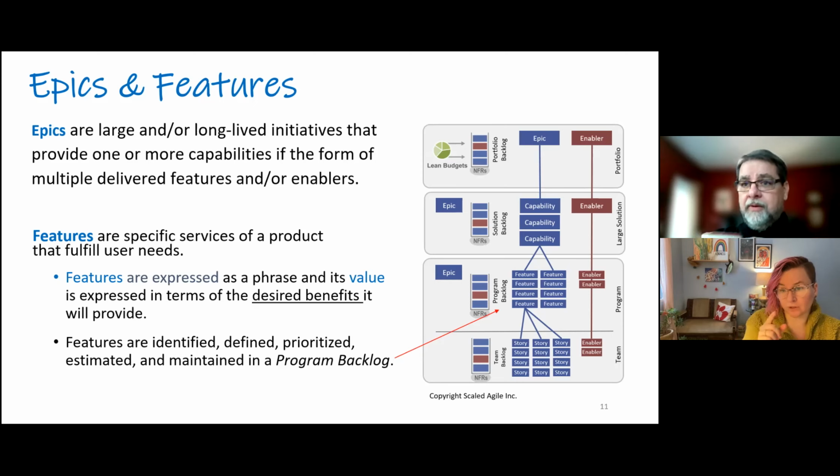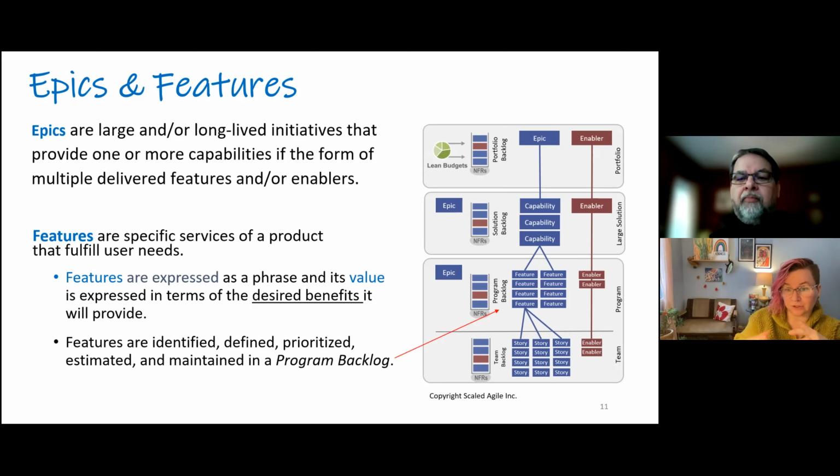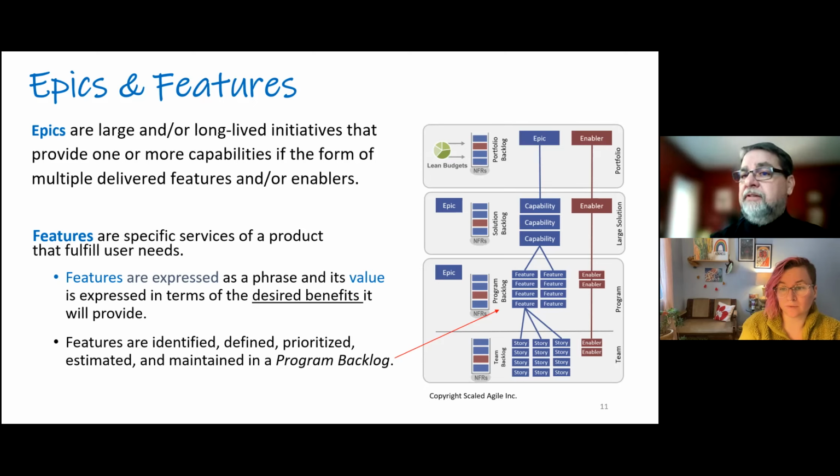Would you create a workflow like this before you even start the project? And then you would revisit and edit the features and stories as new data comes up? So you would create a scaffolding with a lot of TBDs, placeholders, right? And you start filling this out. What you might do is have your epic, take one capability, take one or two features, then take the stories for it. Okay. And you try to create a full slice down. So you begin doing something that will help validate the hypothesis at every level. And then figure out if you should be going anyway, or if you should change the epic.